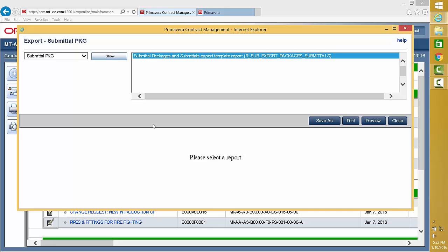So, okay, it's 05, right? And it's a drawing, so it's a WS, right? It's for Z or Riyadh? For Riyadh, so it's an I0, and what is that? It's the hospital. So the hospital is B0100. Guys, you go to the document management plan, you learn how to build a code, and with that code you can find everything, because this is how they are stored. If you are lucky, maybe the title says Raft Foundation 4, so you can find it even by the name.